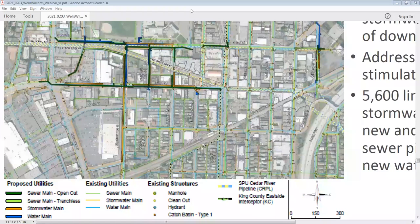Yes. And the way this project is scheduled, as they come through, the contractor wants to put permanent patches down as fast as possible. So it's not going to be temporary cold mix patches. It's going to be hot mix patches. The goal is to have the road drivable. Now, that being said, we're not going to be trying to make a freeway smooth road, but it's supposed to be the final patch, so that when they're done, they just do a grind and overlay as opposed to having to strip it out and do a final patch. Where we will have some issues is when the utilities cross. We might come through, do one, and then have to cut into that new patch to do the next one. But the goal is that between point A and point B, things will be as close to back to normal as we can until we come back.